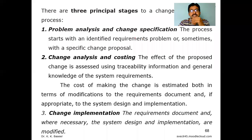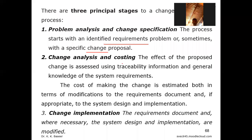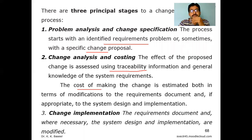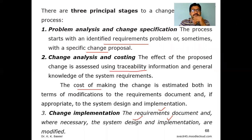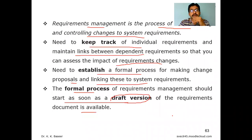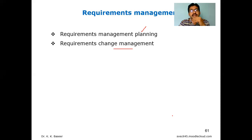All stages — problem analysis, change specification identifying requirements, change proposal, change analysis and cost impact based on traceability information — are part of the process. Once done, change implementation is carried out, applying necessary changes not only to requirement documentation but also to system design and implementation. A change in one thing does not belong to only one phase — it affects communication, planning, design, implementation, deployment, and everything else.